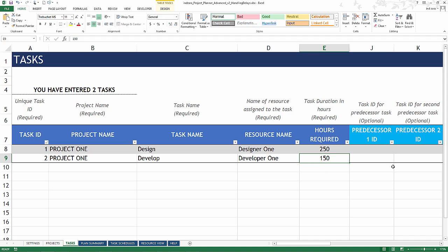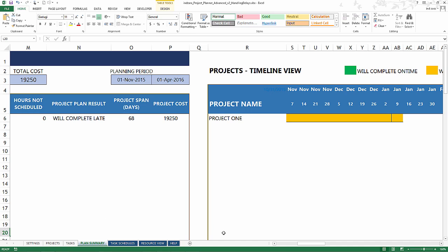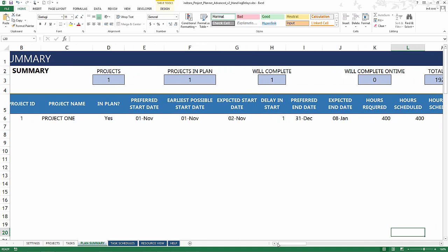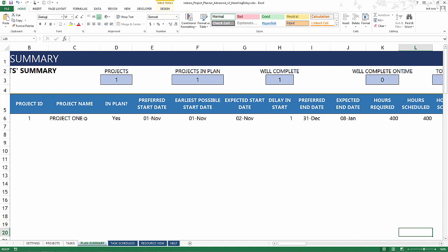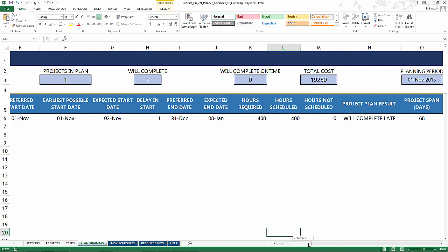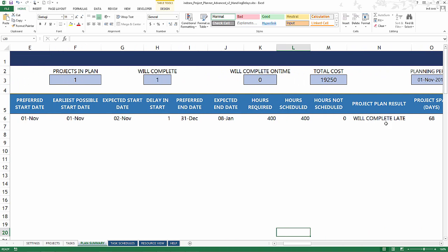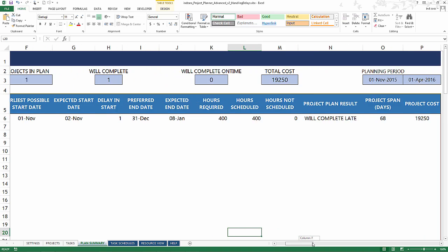We don't have any predecessors. It's a very simple scenario. The plan summary tells us that Project 1 is expected to start on 2nd November and expected to end on 8th January. So clearly that is after our preferred end date. The project will complete late and now we're going to find out how and why, and then we're going to try to address the scenario.